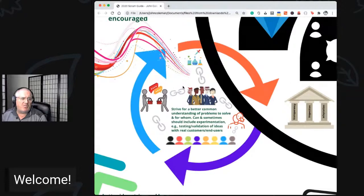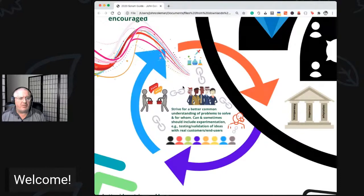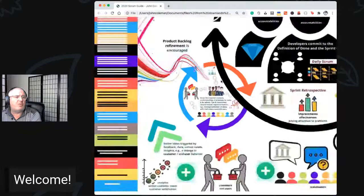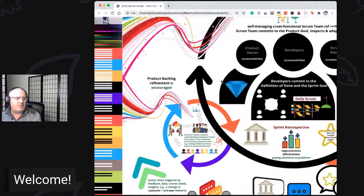They're more or less recommending refinement now — striving for a better common understanding of the problems we're trying to solve and for whom. Hopefully customers, end users, and stakeholders are in refinement. Hopefully the product owner is acting as a matchmaker between the developers and stakeholders, maybe even designing experiments — a hat tip to Lean UX. Really nice to see the stronger promotion of product backlog refinement as an activity in single-team Scrum.